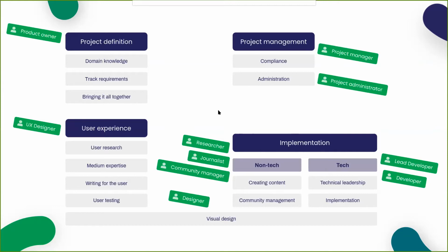But at the same time, there are enough people able to own a project and have different things going on. So what happens is we're switching between a lot of projects at the same time. But the nature of a lot of Civic Tech projects, for us at least, is that you often make a bit of progress and then you're blocked waiting for something like another NGO who needs to do something, or government who needs to provide some data. So you can't just sit down and work for 1 week or 2 weeks or 2 months and get it done. So you do have to switch between projects.